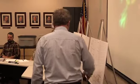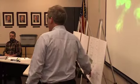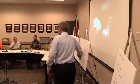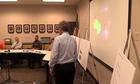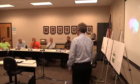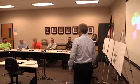Well, this is true on conventional too. Building on top of something, even if you plan for it, has been done a few times, but seismic codes change. So usually if you're going to plan for expansion, do it horizontally, and don't put it on top of something. It's a pretty big piece of property. And maybe there are classrooms that could be admin now that could be switched over to classrooms later, but this wouldn't go into a two-story scheme at a later date. Do it up front if you're going to do it. Yeah, build it two-story right away, because who knows what seismic codes will be, and that's the main thing. Maybe fire life safety will be different, maybe three staircases instead of two, who knows, in 10 years.